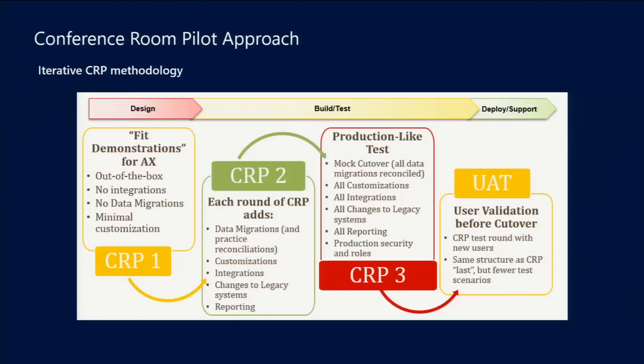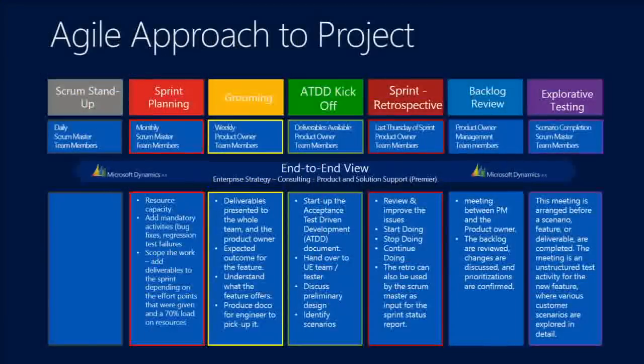So the SMEs, by the time we get to UAT and training, are pretty fluent in the way the application actually works. And the issue that I see on a day-to-day basis when I'm brought in as an escalation is the customer doesn't understand how the business process is going to fit their need. Because we go away, we do all these requirements, we build, we then UAT. And they're like, hang on a second, that's not what I wanted. I didn't realize that you were going to build it like that. And then there's this backward and forward. The project grows. The length of the project, the cost of the project, everything starts to tumble. Whereas with this approach, we're biting off smaller pieces and we're feeding that back to the customer on an iterative basis.